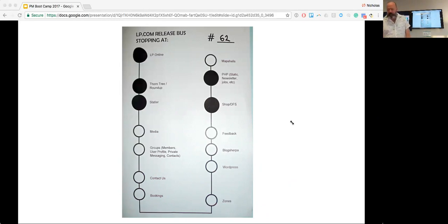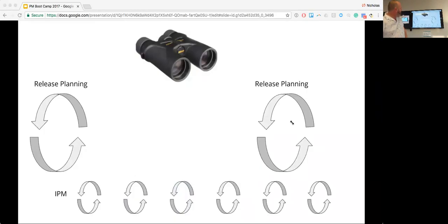So release planning is still very relevant. As I said, we use it to create a fuzzy long view, and we would certainly do some release planning at the beginning of a project, in the discovery and inception phases. It's like a giant version of an IPM. The IPM is our short-range detailed planning, an iteration planning meeting that happens every iteration, whether that's monthly, weekly, or fortnightly.